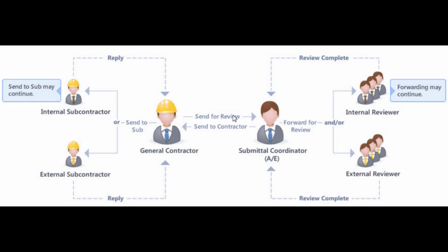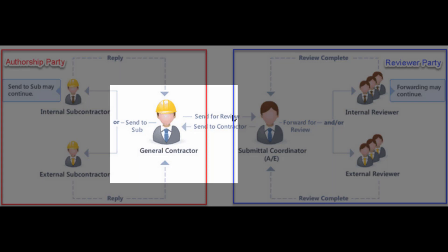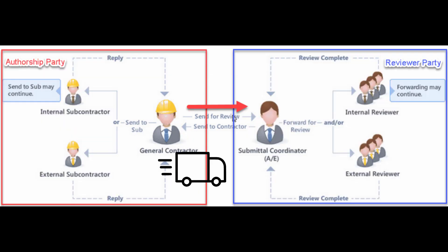In this video we are going to look at the submittal review process workflow. Like any other review process, the submittal review process is a collaboration between two parties: the authorship party and the review team party. The authorship party is led by the constructor, who is responsible for creating the submittal items, attaching shop drawings, data sheets, product data, and other documents to each submittal, then bundling the submittal items into a package.